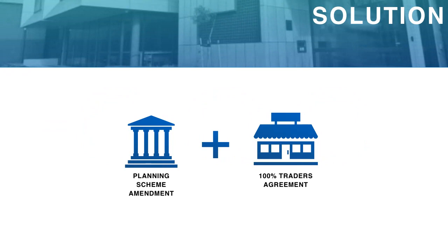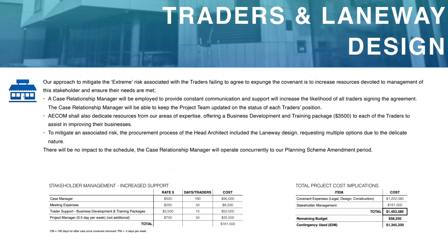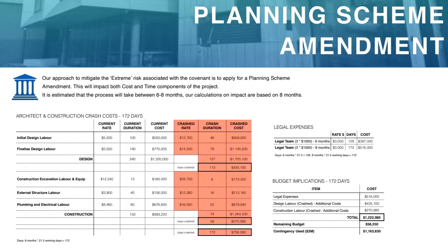You put the mitigation measures in a column to show how you minimize or deal with that risk. You could actually link it to your solution as well. So that student had the mitigation measure and showed how there would be a potential solution and how it can be implemented within the other assumptions, perhaps with cost, and how that would change cost.